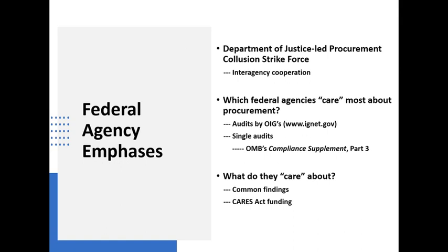Arguably, if the contractor was involved in helping you estimate what it should cost, that's not the same as the solicitation itself. Somebody might argue that gives them a competitive advantage, but for heaven's sakes, when you publicize an invitation for bids or a request for proposals, don't tell them what the budget is, the total.